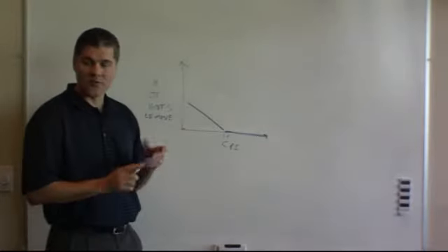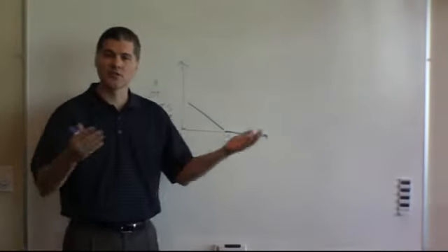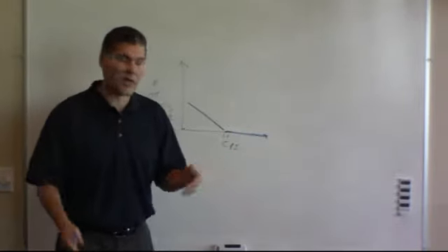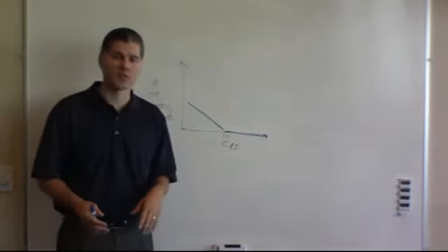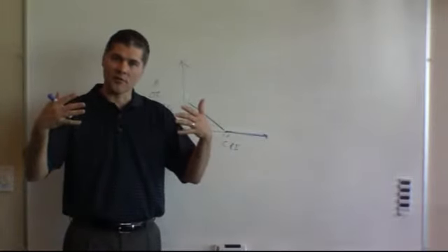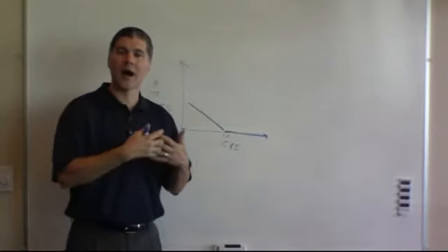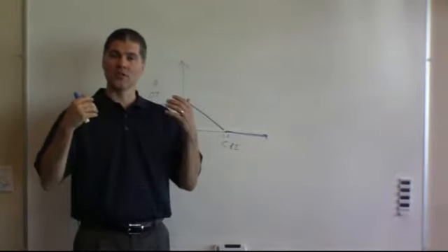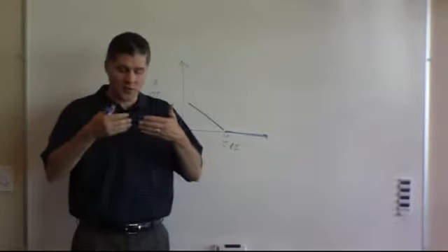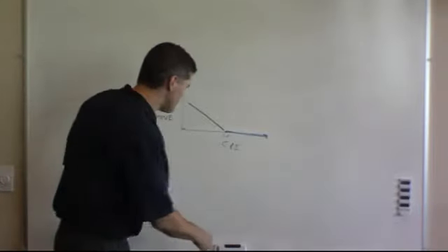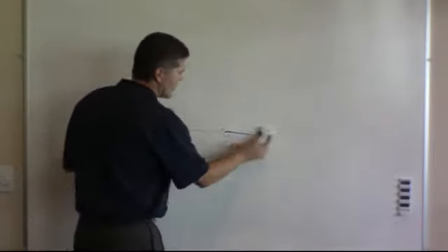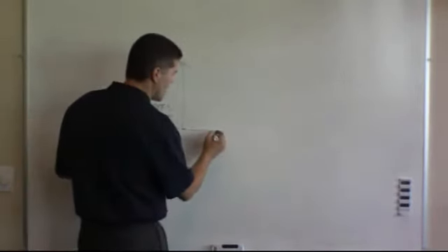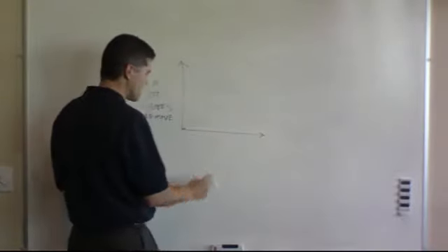And so actually what's very interesting is cost pressure and schedule pressure fight against each other all the time. And it's hard to actually react to both of them. That's why we give you charts for the 4 different options, because the reactions are exactly opposite. When I am behind schedule, I want to add overtime. But when I am over budget, I want to take people off and save money. So those two fight against each other all the time. So that's what the overtime charts look like for schedule pressure or for SPI and CPI.